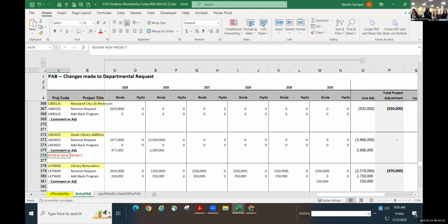They're also doing electrical work. They don't have the power infrastructure to meet demand, so I'm wondering if that's for computers. Yeah, and that is the hard thing about estimating square foot cost for additions and renovations, because you've always got what's existing that you have to go in and fix. So it's not a straight square foot cost. Maybe I'll put it in and make a note to revisit. Sounds good.